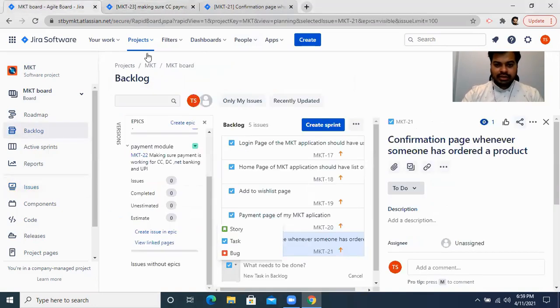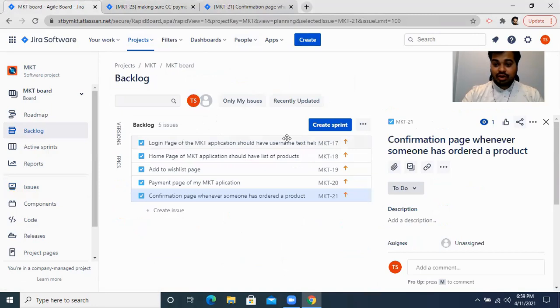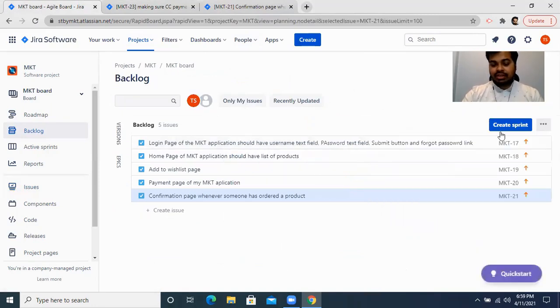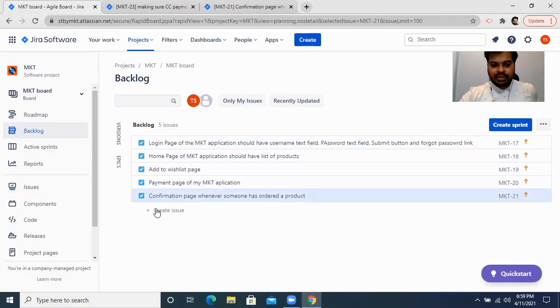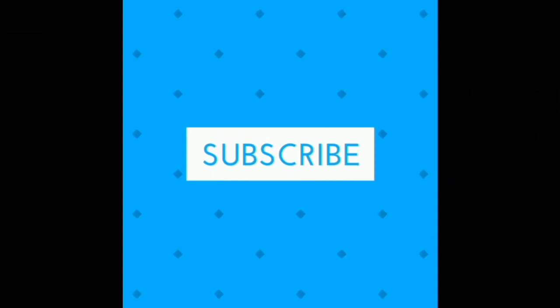This is how you work on the product backlog in companies following agile methodology. You can add as many tasks as you want. The scrum master or product manager creates the product backlog from requirements and then moves these backlog tasks into a sprint. How they do that, I will show in my next video. Until then, take care, guys — thank you so much.